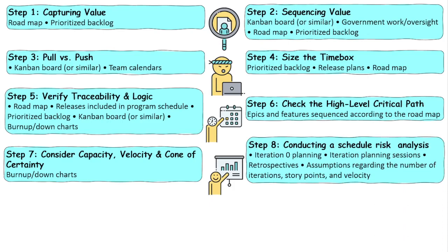We could also use the concept of planning in a detailed fashion. Some people call this sprint zero. There's a lot of controversy in the Agile space as far as whether it's useless, whether it should be done. But the main thing is, before embarking on a schedule, take some time out to do some planning. Take some time out to do your intentional planning, backlog preparation, sprint planning, story writing sessions, retrospectives. All of these will help you. They're all risk coping mechanisms.